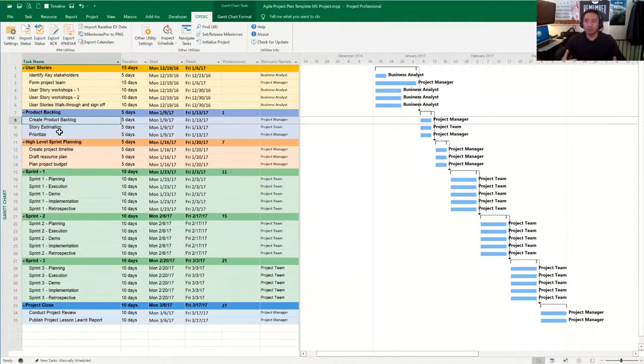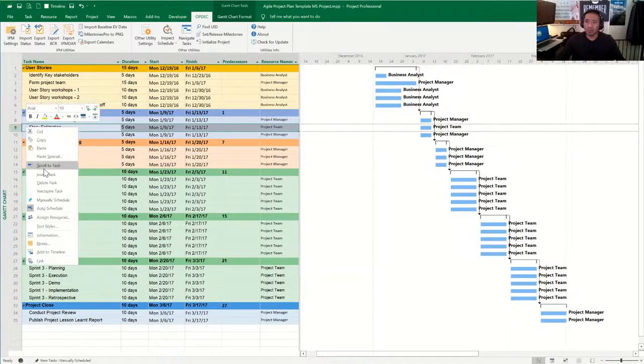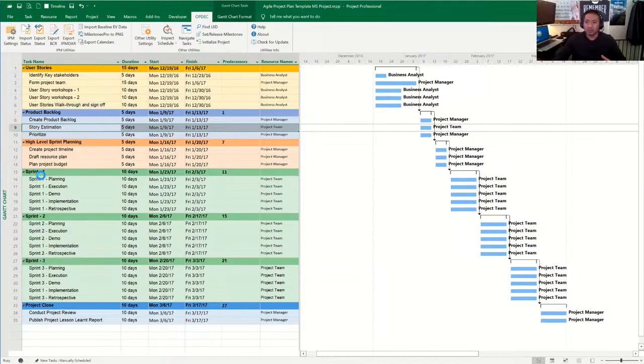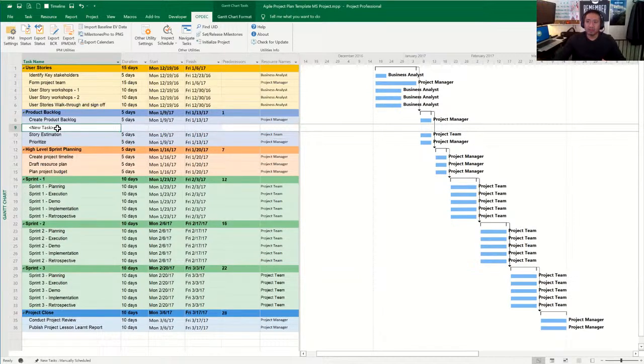So how I would do it, and you're more than welcome to apply this as well, my technique, which has been beneficial, is adding a subtask, which helps with separating the logic. So adding a subtask in here, and then just adding a delay due to software not delivered on time.